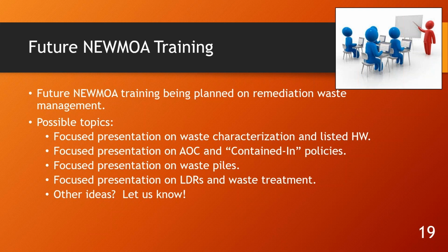You haven't taken it out of the area of contamination. You're just testing. But I would start thinking early on about whether or not you meet the RCRA requirements, and then you can decide whether or not you need to keep the waste within the area of contamination until your sampling results come back.